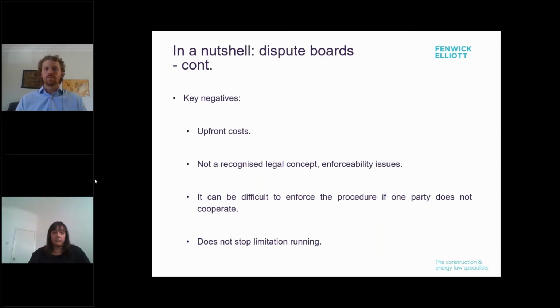It is nonetheless important to select the DB that is appropriate for the project, and I'll go through the various options when we get to procedures. Other negatives include that DBs are not a recognized legal concept in and of themselves, and this means that there can be enforceability issues, which I'll discuss later, difficulty enforcing procedures if one party does not cooperate, and commencing a DB procedure, unlike arbitration, does not stop limitation running.